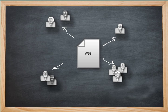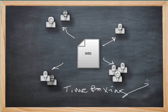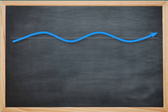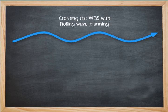One other technique that works quite well is timeboxing the creation of a WBS. All in all, the WBS can be viewed as the center focal point to get a team working together to define the work for a project. There is a risk with creating a WBS with way too much detail. There is a concept of rolling wave planning during a project's life cycle, where the iterative nature of modern-day projects postpones the actual lower-level work package definition until other project clarifications have taken place.